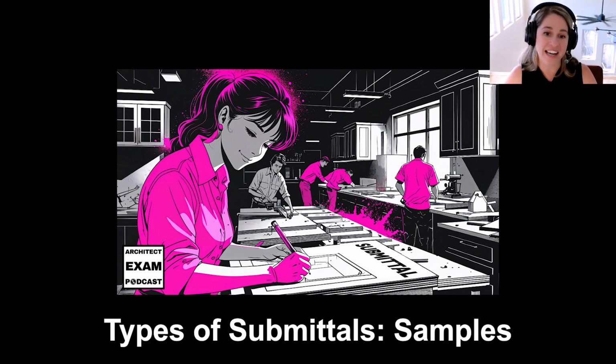I once had a client who approved a floor tile just based on an image that they saw on a website. But when they actually saw the physical tile sample in person, they didn't like the texture of the tile and it wasn't what they were expecting. So having that physical sample handy really helped us and saved us from a lot of headache of ordering the tile, receiving pallets of the tile later, only for the owner to not like the tile at all.